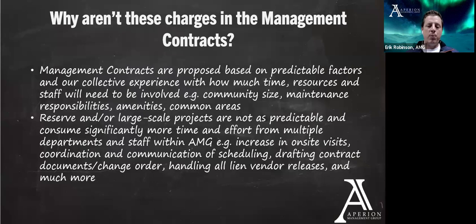Reserve and large scale projects aren't as predictable. As you can probably guess, they consume a significantly greater amount of time and effort from multiple departments in Aperion to pull off, right? So we're talking about the increase in on-site visits. We're talking about the coordination and communication of all the scheduling, the contracts, the documents, change orders, lien vendor releases, and a whole lot more that might occur during the execution of that project.